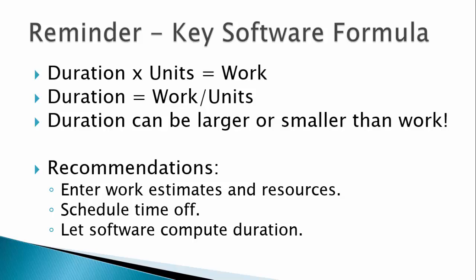Back one more time to our formula, you should be observing that as you are making assignments, the durations are being filled in. The task form allows you to see how the work is split. You manage the project, not the software, so adjustments can be made if the software decisions do not reflect your plans. By now you have probably noticed that all durations have a question mark next to them. This is a reminder to you that the software estimated the duration by the formula.